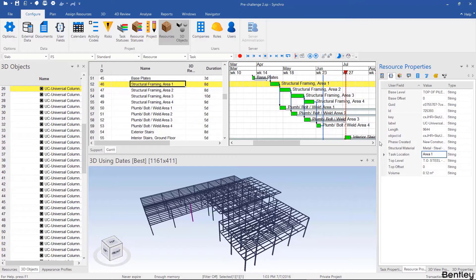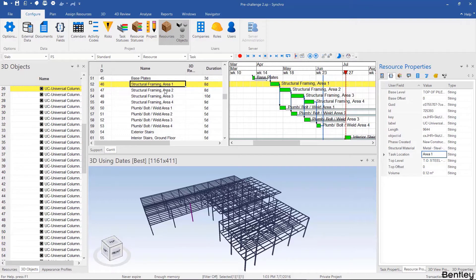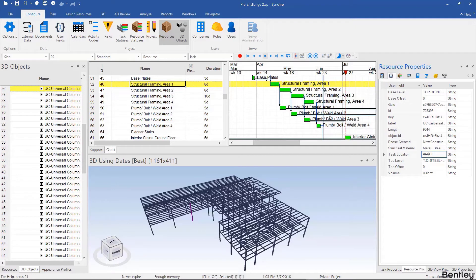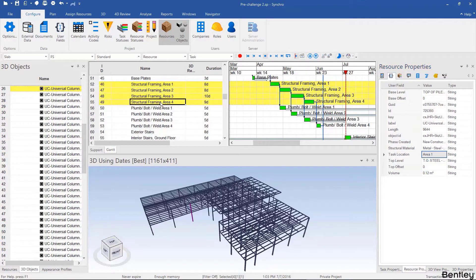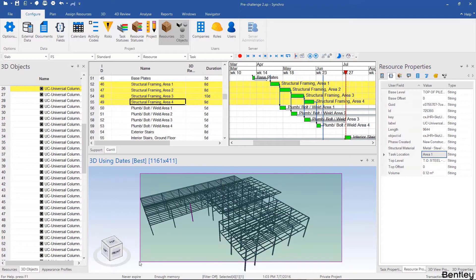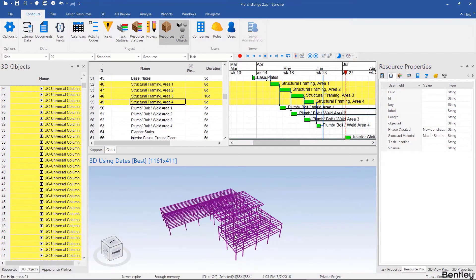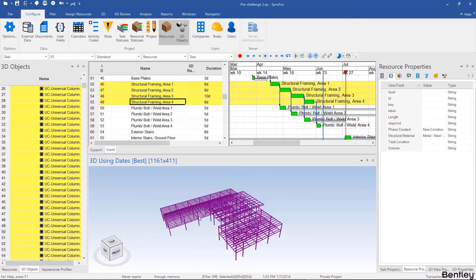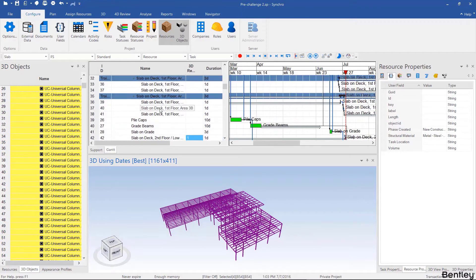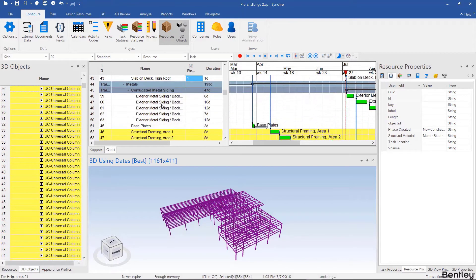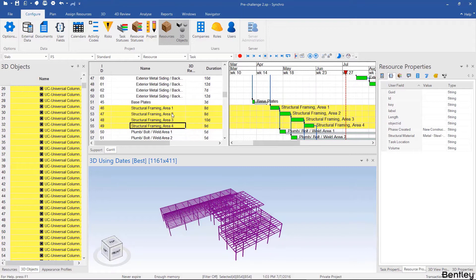Usually you're matching a user field to either part of the name of the activity or an activity code that is in your schedule. Since we only have one thing to match, we're going to have to use controlled auto matching, which is when you select the activities, select the resources, and then tell Syncro to only run the auto matching algorithm on the selected activities and resources. This saves us from accidentally auto matching the steel for area one with, for example, slab on deck area one, or structural framing area one with the foundations area one.